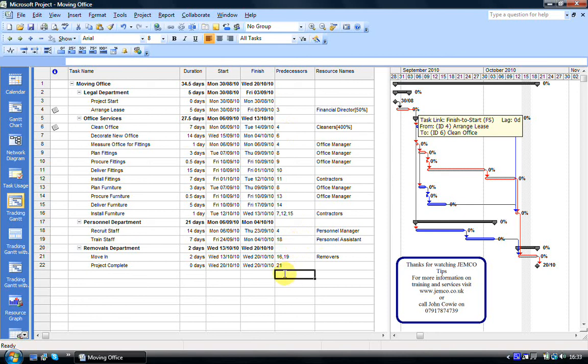Another thing that would be a good indication for myself as to whether the plan's had some effort put into it is that there are resources on those same tasks at that same level. I tend not to advise people to put resources in at the higher levels within the plan, and as you can see, this plan indeed does not do so. One of the other good things in terms of has anyone put any thought into the plan is the use of notes. If I look in the indicators column here, I see that we have got notes in the indicators column. Alright, not in every task, but at least there's been some effort put into it with regards to the creation of notes. Notes are very useful. They stop us having to keep on repeatedly telling people what's supposed to be going on with a task, because we can just print them out with the task lists and so on and so forth.